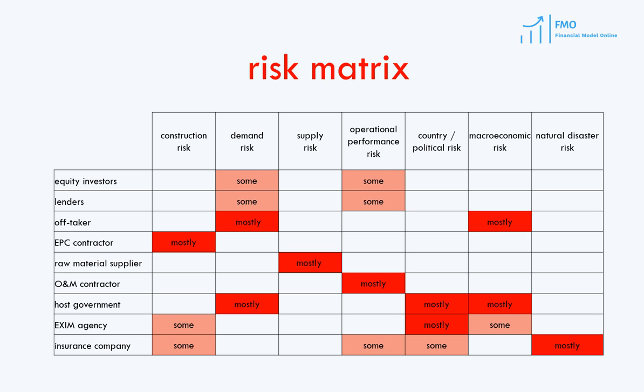You can see, for example, that the construction risk is mostly taken by the EPC contractor, revenue risk is mostly taken by the off-taker, and so on. In a perfect world, we would allocate each risk in the project to the party most capable of handling it, which would allow significant reduction of the financing cost of the project and would eventually translate into a benefit for end-users of the product or service. However, in the real world, there are many shortcomings in risk analysis and risk allocation, which sometimes result in project failures.